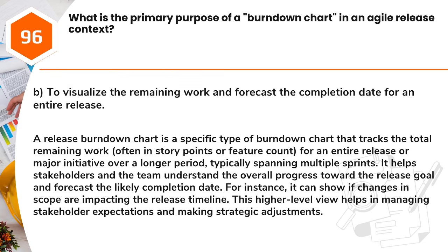Answer: B. To visualize the remaining work and forecast the completion date for an entire release. A release burndown chart is a specific type of burndown chart that tracks the total remaining work, often in story points or feature count, for an entire release or major initiative over a longer period, typically spanning multiple sprints.